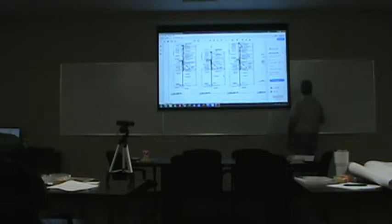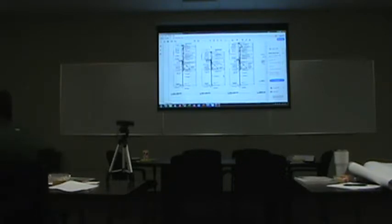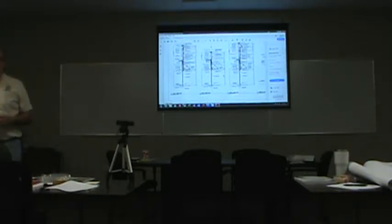Roof blocking. Okay, are any of those activities dependent on the other? You have to do one before you have to do the other? Yes. Okay, tell me where that is. The framer's got to build a parapet wall before the blocking goes up. That's right. Now let's look at that detail just a little bit closer. All right, I see a parapet there, okay? But what do I see? Just under that blocking, what does it say? Steel beam.